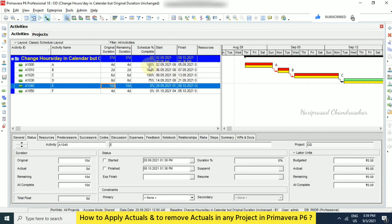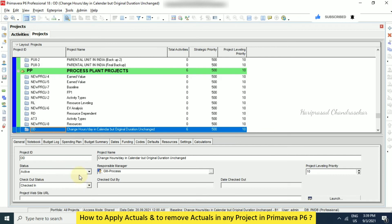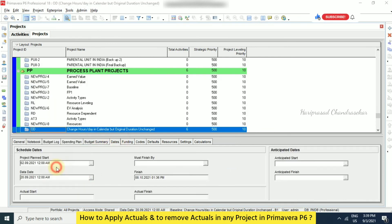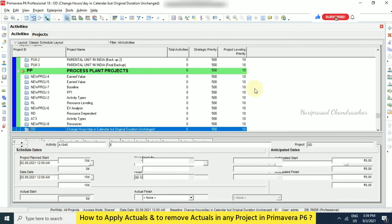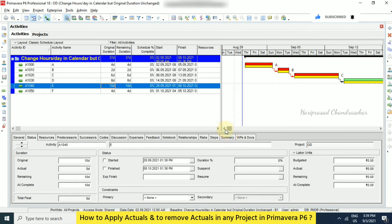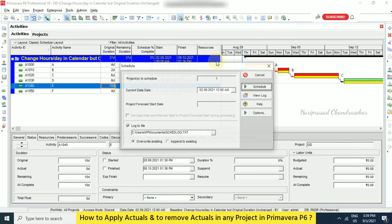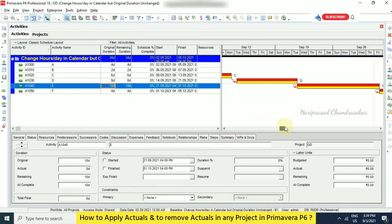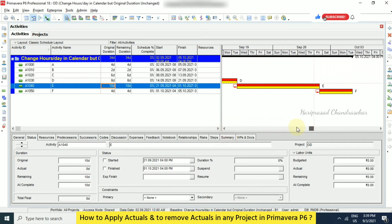But here we need to remove the schedule percentage complete. How? We can just go to project and we can go to dates. And here you can change the dates. So it should be equal. So now we can see. So we can remove the progress spotlight. So now we can see everywhere zero percentage. Only scheduling is needed. See now we get back the previous data.